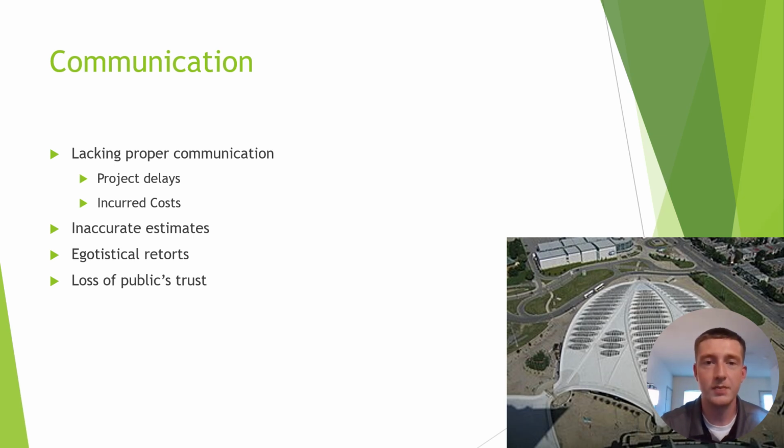Communication from Mayor Jean Drapeau and architect Roger Talbert provided multiple instances of confusion and inaccurate facts. These actions created distrust for the project's viability and left members of the public wondering about the success of the project. An example of this was in the addition of a water cascade to the parking garages around the Olympic Stadium. Late in the game, Talbert insisted on adding a water cascade to the top of the parking garages connected to the stadium. This added at least $8 million to the cost.